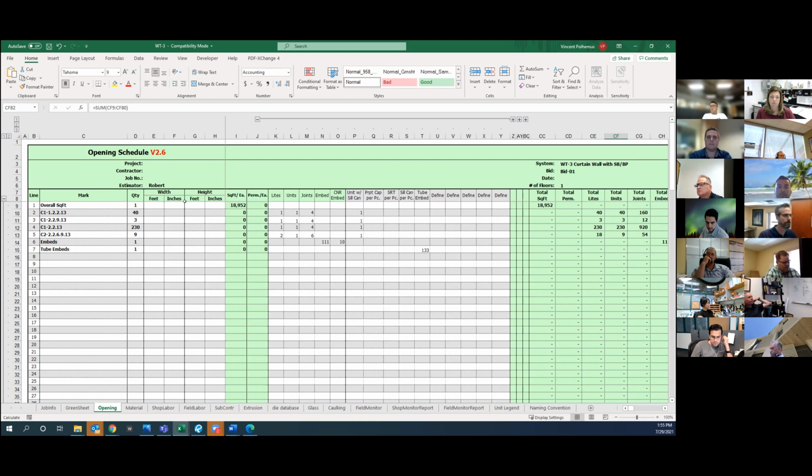Is that something we should know for the next job? Is that something we should talk to the customer about? We can track it, because today we're just not doing that. It's not trackable. We're looking at total units and just saying it's 5 units per pallet, but that's not the reality of what the pallet schedules actually look like.